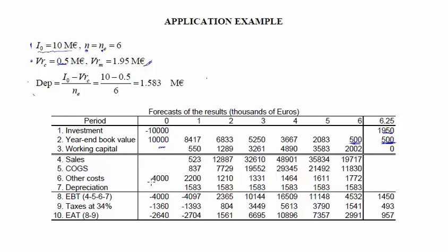We have information related with other costs in line 6. This may be other investments that we need to make, but these investments are not in physical assets, so they cannot be depreciated. But we have also other costs during the life of the project. Now we list here the depreciation because we consider it a cost for tax purposes, but then of course we will need to put it back because it's not a cash flow. This is not a cash flow.